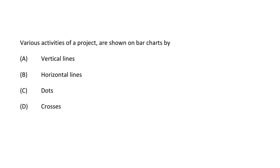Next question: various activities of a project are shown in a bar chart by — option A vertical lines, option B horizontal lines, option C dots, option D crosses. The correct answer is option B, horizontal lines.